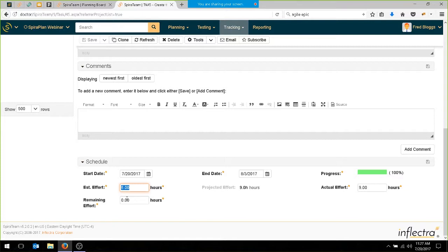And the remaining time that's left is actually used to calculate the percent complete. We found in testing that most people don't have a good way of estimating intuitively a percent complete. If you ask someone how much time is left, they actually have a very good estimate. I've got about 2 hours left. However, if you ask what percentage you've done, they'll say, oh, I'm 90% done. And when you compare those two numbers, there may actually only be 70% done.